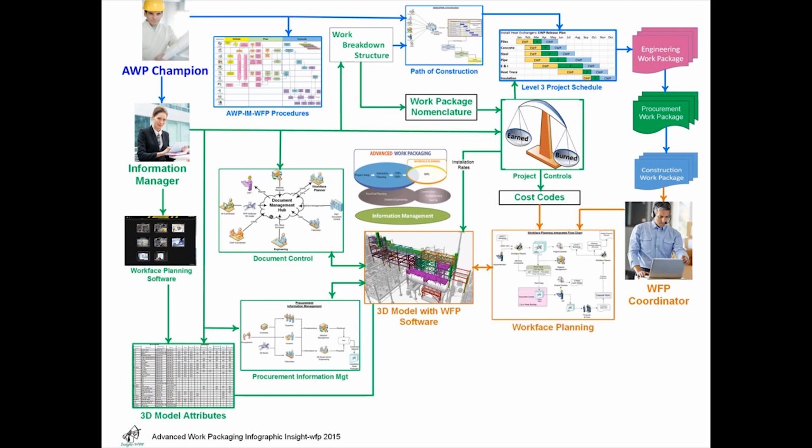Moving into construction, the workforce planning coordinator, working with the construction contractor, develops a department of workforce planners and trains them on how to use the software to create installation work packages. The coordinator manages the department to ensure the constraints are identified and removed, and that the department maintains a backlog of executable work. Training sessions conducted for field supervisors and construction management will define their changing roles and responsibilities in support of workforce planning.